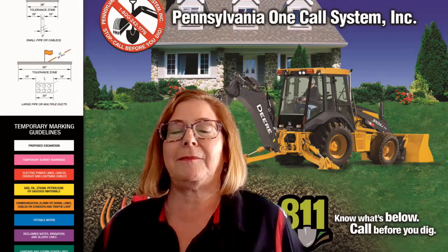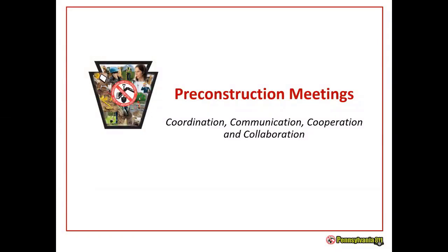So pre-construction meetings: coordinating, communicating, cooperating, and collaborating with each other. We all go to lots of meetings all day long. This particular meeting is the one that you like to have right before construction to get together with your facility owners to set your locate schedules and to talk about the flow of your construction so that you can put your tickets in a meaningful way for the locating community.